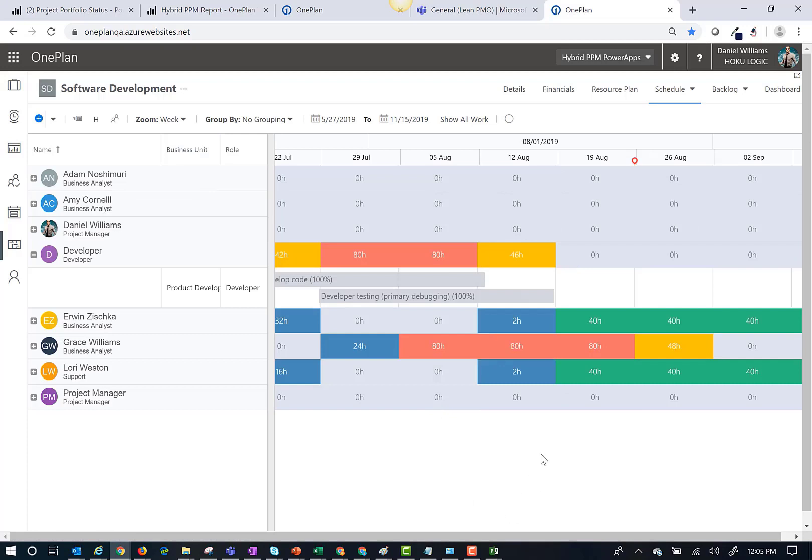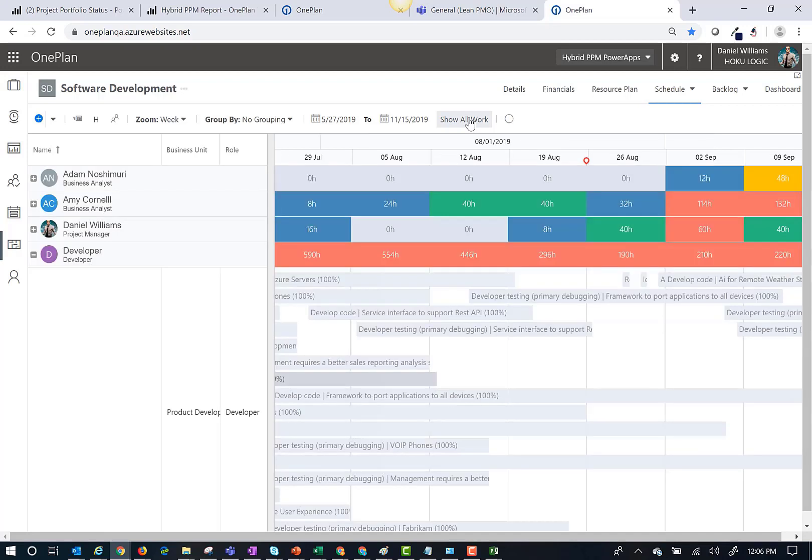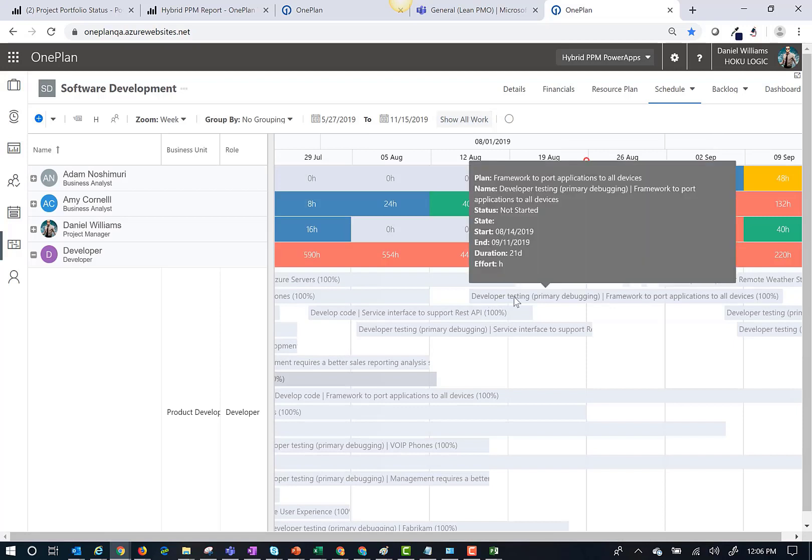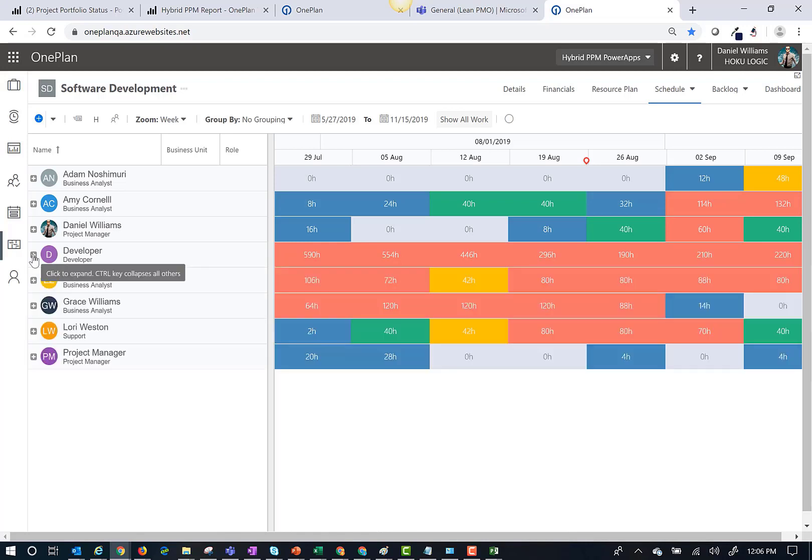I can also change the zoom to drill in and out on date ranges. By clicking all work, I can view resource assignments for all the plans in OnePlan. By bringing in the assignments from all the other plans in OnePlan, I can now see the resource's tool that provides true availability.